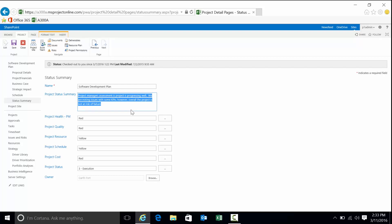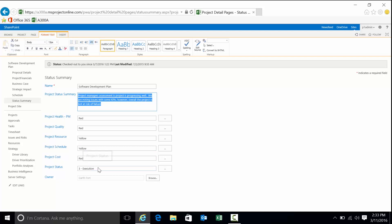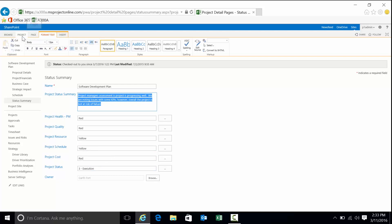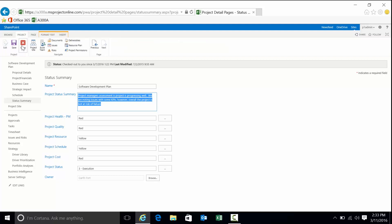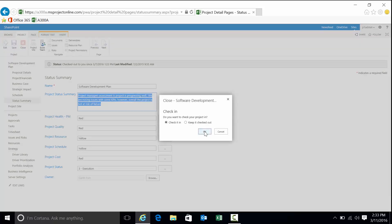This final form, name status summary, is really a form intended to be filled out every status reporting period by your PM. We have five KPIs. They right now represent just the colors based on a process that's done outside the system. Red for health and quality, yellow for resource and schedule, red for cost. Currently, we're in a status of execution. So that's what the information is going to look like when you're looking at the project detail.